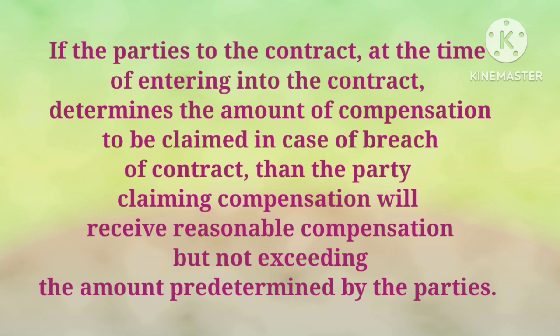Also, it is to be noted that mention of a specific amount of compensation does not necessarily entitle the plaintiff to claim that particular sum that has been mentioned in the contract. However, it is the court which decides the actual amount to be paid to the party claiming the compensation. But the court cannot award higher damages than agreed upon. That is, the court will award the damage, but that will not be more than the amount decided by the parties to the contract in that particular contract.